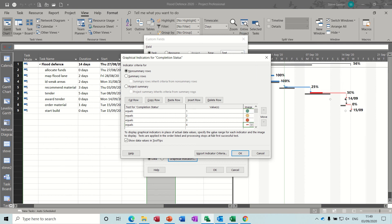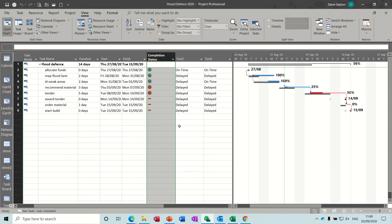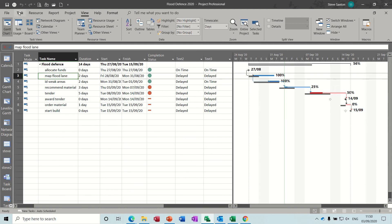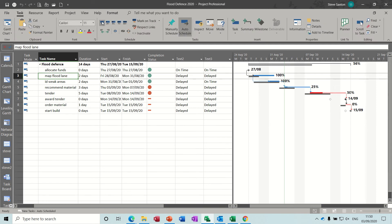That should replace the numbers with those indicators. You can still hover over and it'll tell you the number the if statement is returning — there are no 2s coming back at the moment so that's OK. They're all driven by the completion status. So if I go back onto a task and take it to 0 it gets the dash, 25 stays red, 50 stays red, 75 goes amber, and then it was on 100 so I'll put it back to 100.